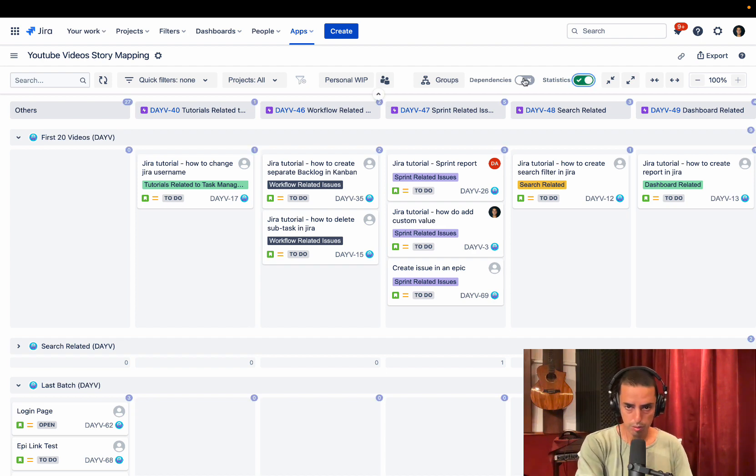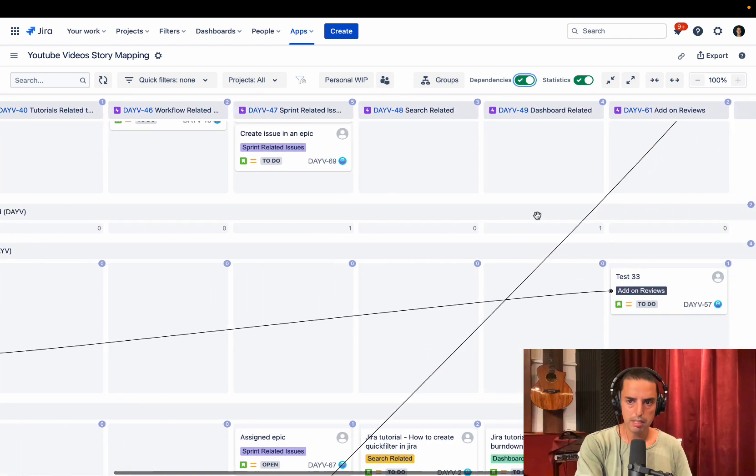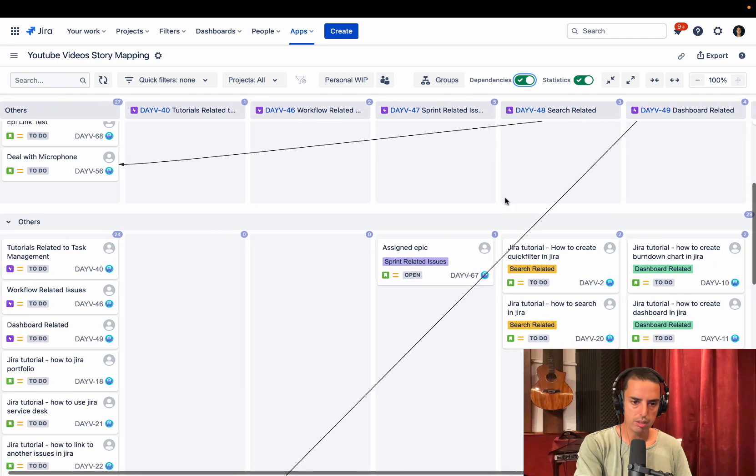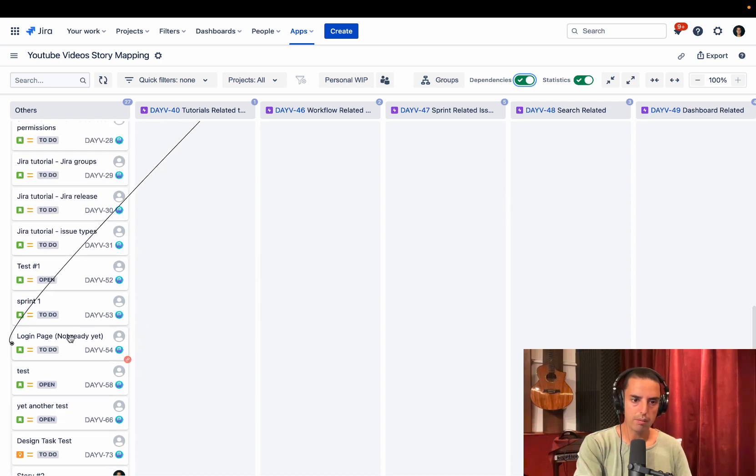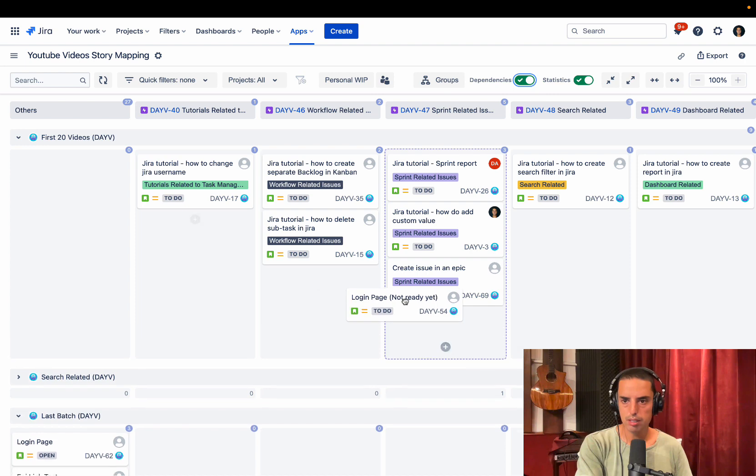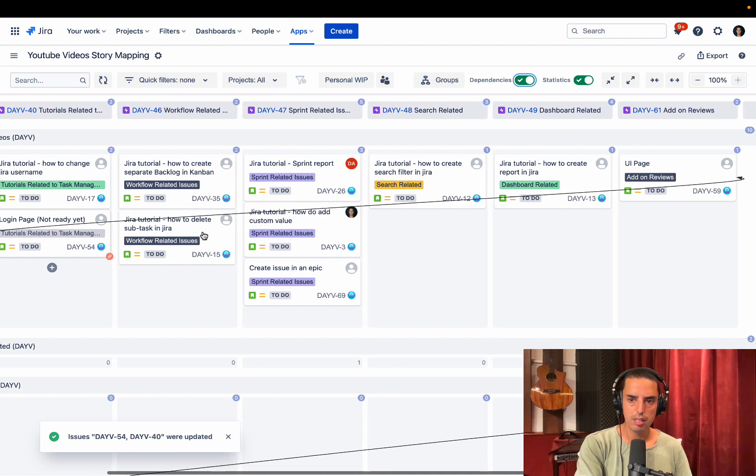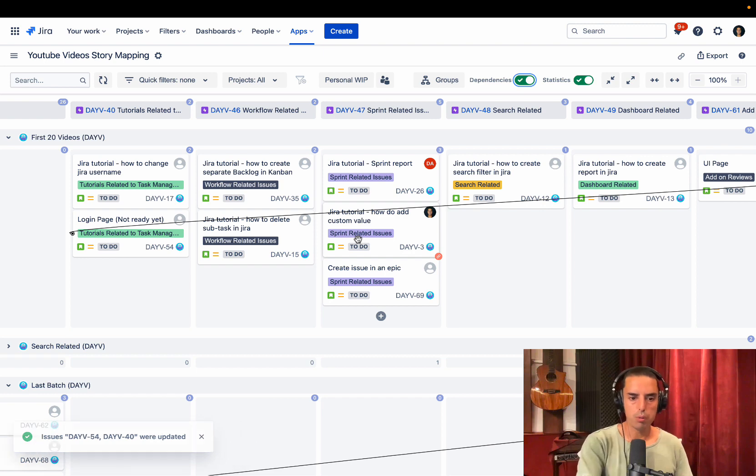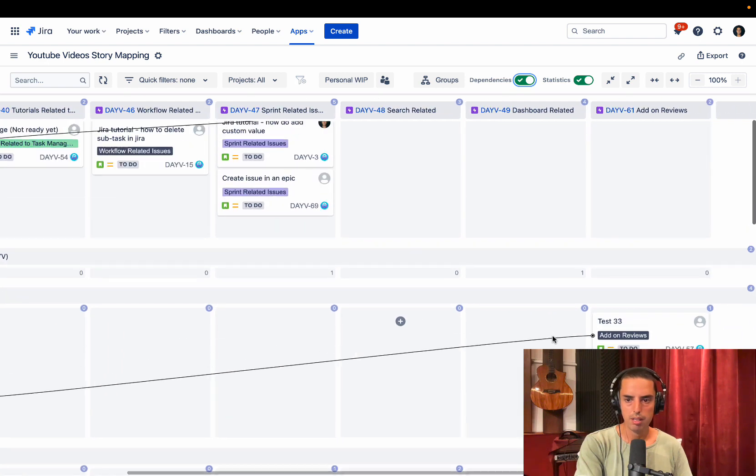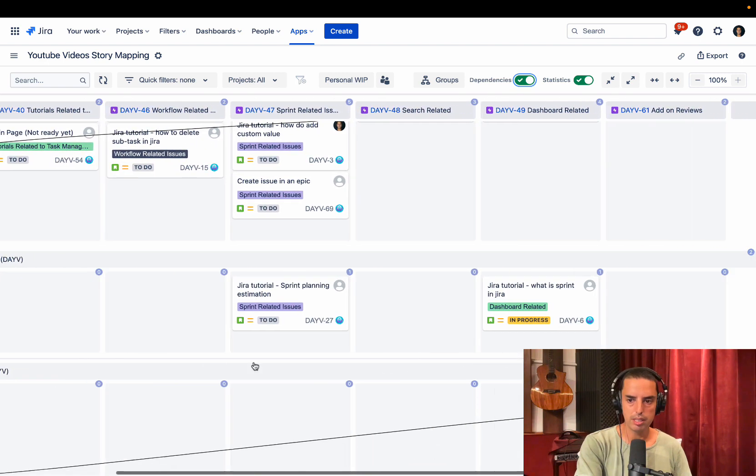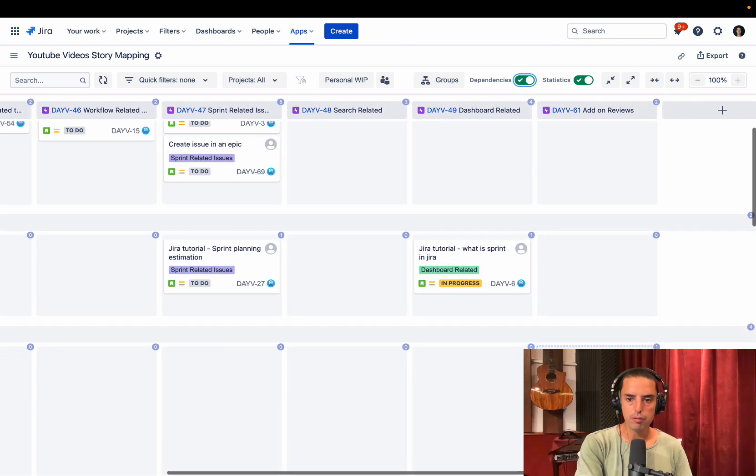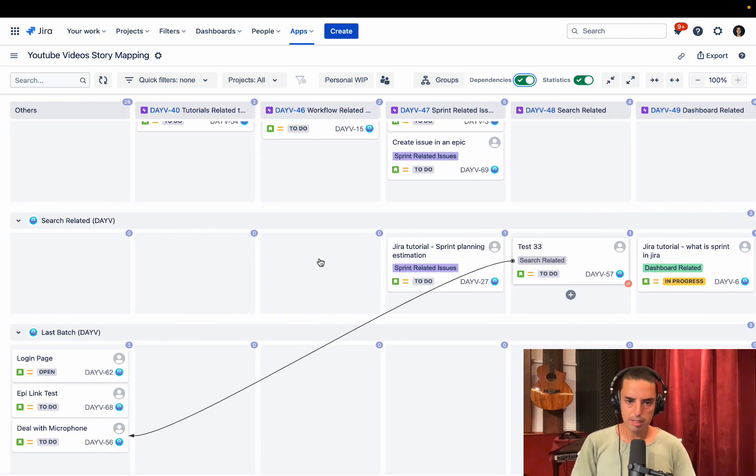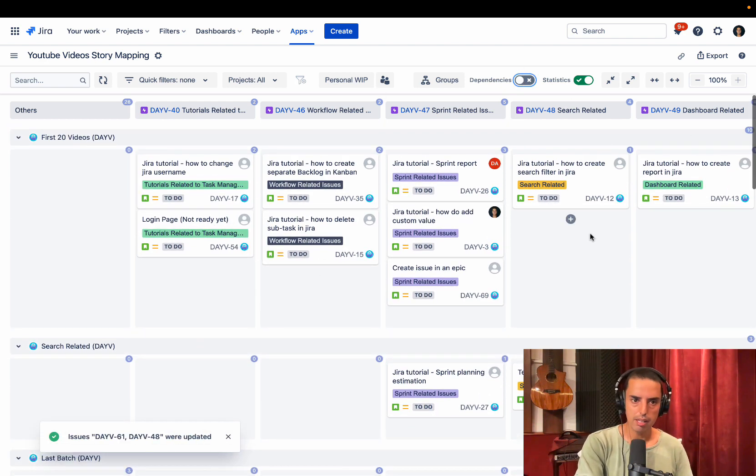There's also a cool thing I showed you before called dependencies. You can see which one depends on another. So we see, okay, we have a UI page and this UI page depends on login page, not ready yet. So we might say, okay, then we really need to put this login page in our first 20 videos to make sure that we can complete it. So we put it here and then we see that, okay, these are on the same release. It makes complete sense. Or we see that maybe we need to do test 33 before we do deal with microphone. So I need to move test 33 in my upper release. Otherwise, well, it won't work because it is blocked. So we move test 33 to let's say search related issues. See the visibility here is amazing. You can see everything in a glance. And if you don't want to see it, you can just uncheck it and you don't see it.